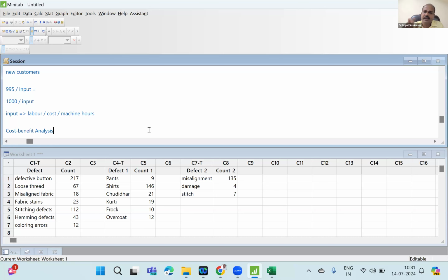All these extras might add up to another 10%. Yes or no? This will add up to another 5 to 6 lakhs on top of 54. So the total benefit is 60 lakhs. In order to derive a benefit of 60 lakhs, you need a project team. How many members might you need to fix this problem? White, yellow belt, green belt, black belt, master black belt. According to the course we have studied.